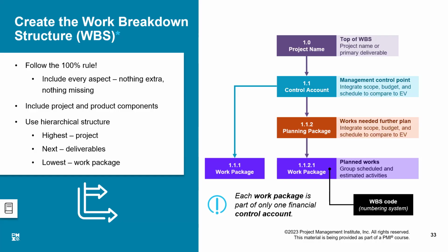Once we have created the WBS, and we go on to the next step, and that is when we start scheduling, we will start time calculations. That is where we have to break down the work package into activities. Then activities will be estimated and things will move on.